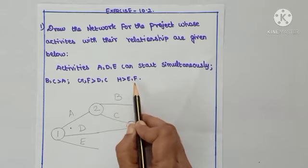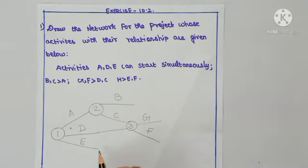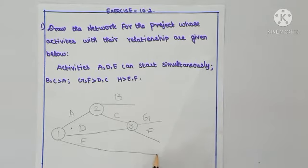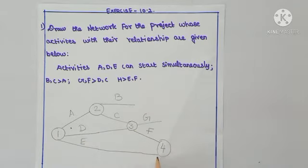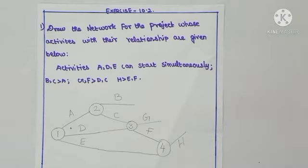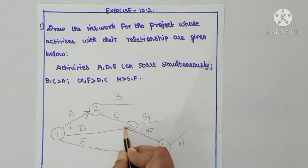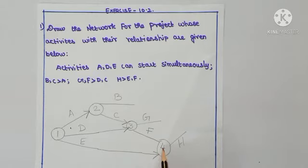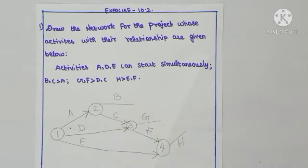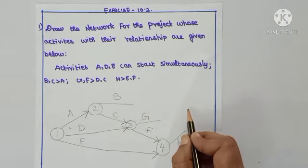After E and F, we have H. So we connect E and F to the next event, numbered 4, from which H is drawn. Now, B, G, and H cannot be left open, so we combine them to the endpoint, the final event.